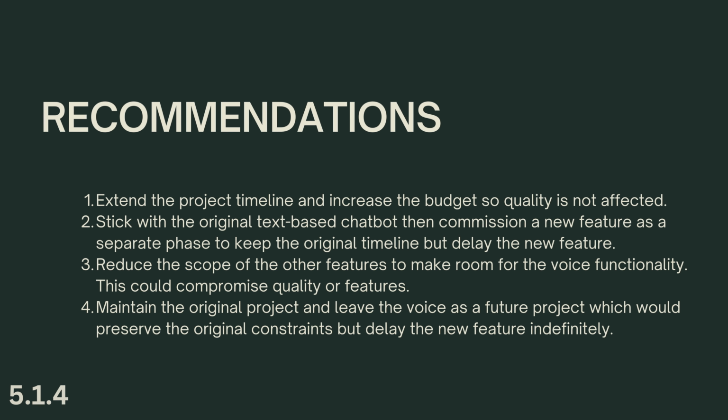So what options could you present to the client? Here are 4 possibilities. Extend the project timeline and increase the budget to accommodate the new feature without compromising quality. This maintains the desired scope but adjusts time and cost.